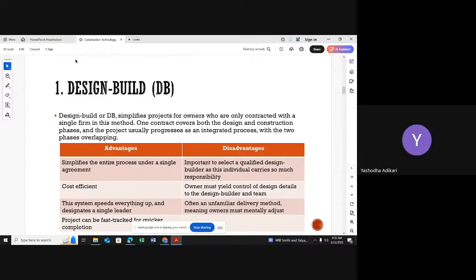Now, first of all, I want to contact my design team. And I tell them I want to do a small change. I need 3 bedrooms on my ground floor. Please complete that drawing and please send it to me. Right? I have to request it from them. Not only that, sometimes I have to pay them again for the design change. Right? So they will take some time. They will do the design and they will submit a design drawing to the client.